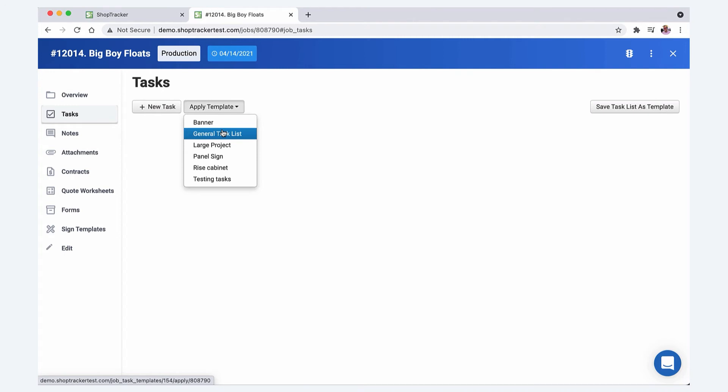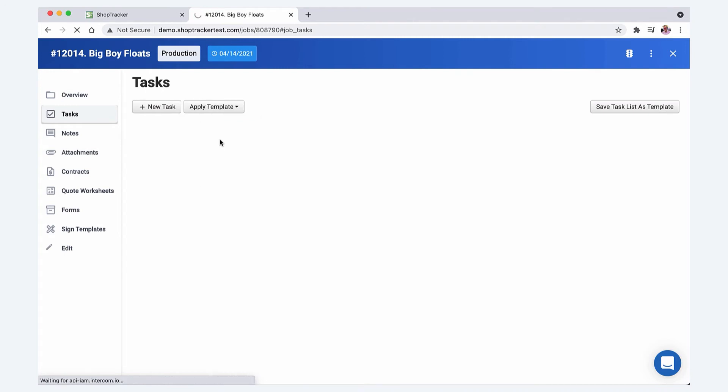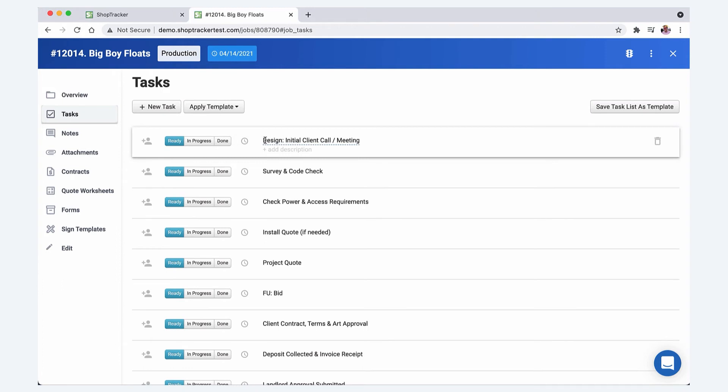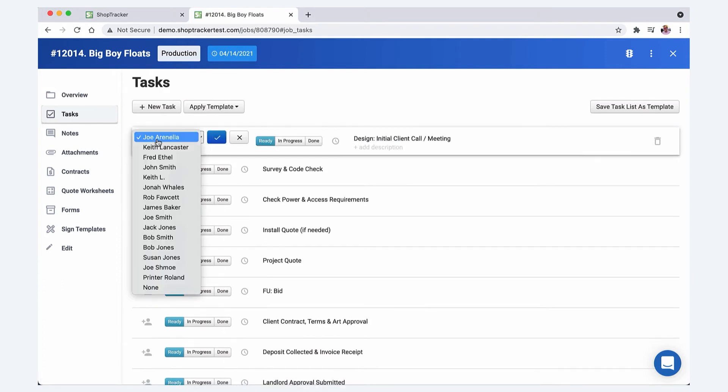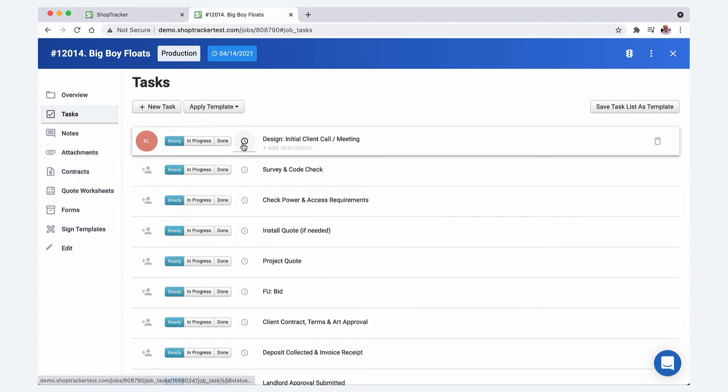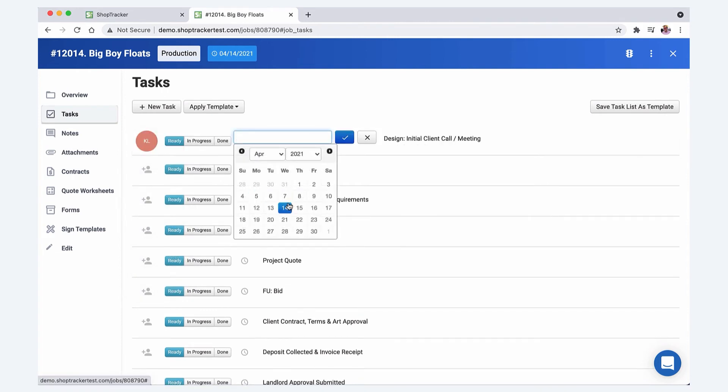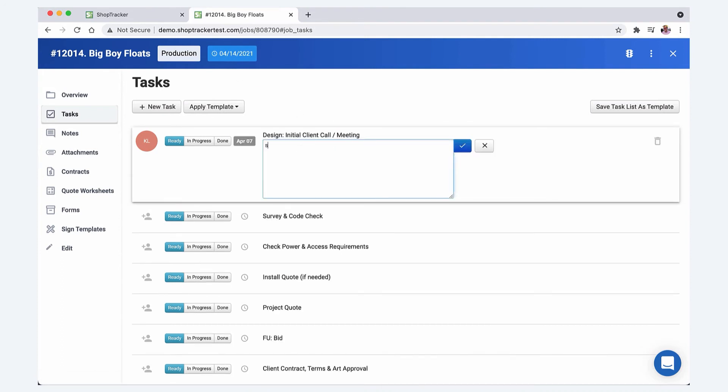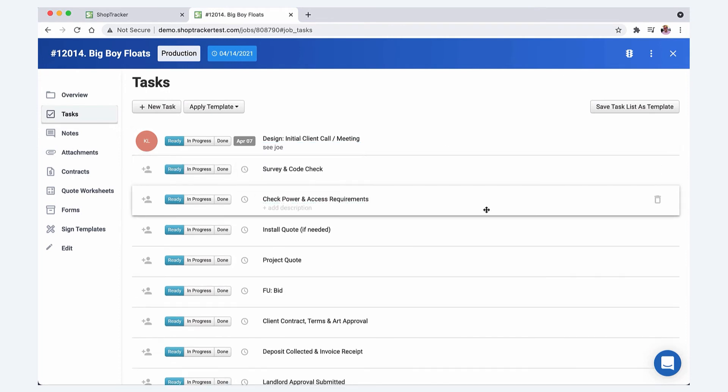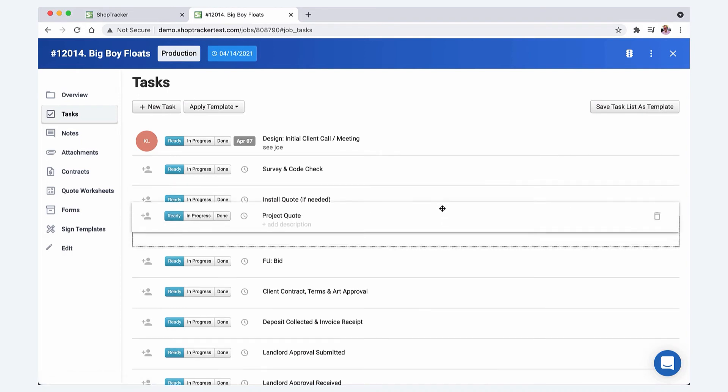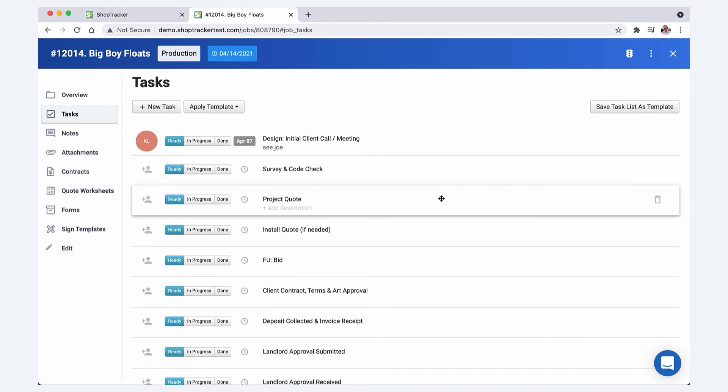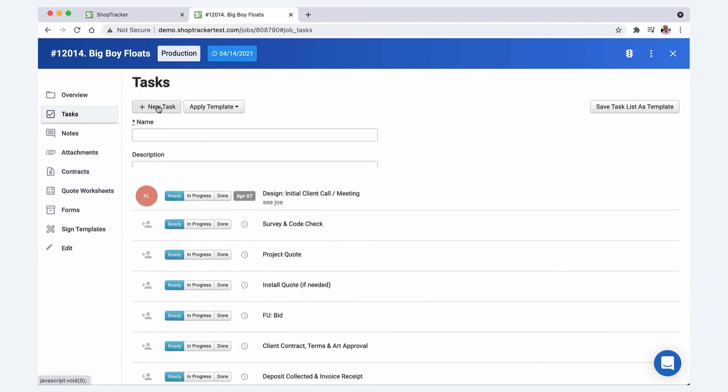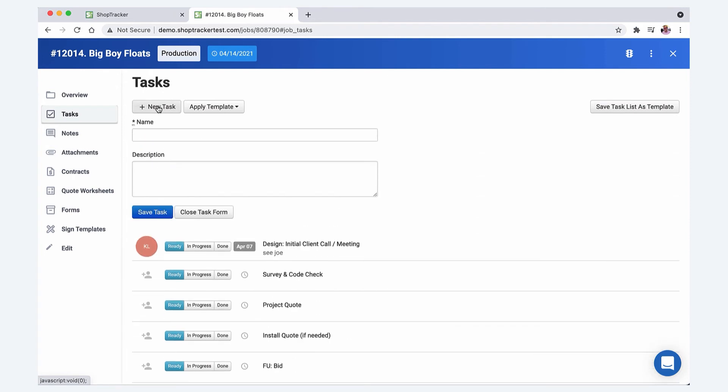If you're a sign shop that does a lot of electric signs, for example, you might have the initial design meeting with the client and this can be assigned to whoever does that and you assign it. Then you can have a separate due date on this that's separate from the due date of the project. Then you can even write notes on this, like hey, see Joe. So tasks, and again, if this task doesn't apply to this one, you can get rid of it. It's not going to hurt the template. You can slide these around, you can add additional tasks to this list and then just slide that around and it's never going to hurt the template.